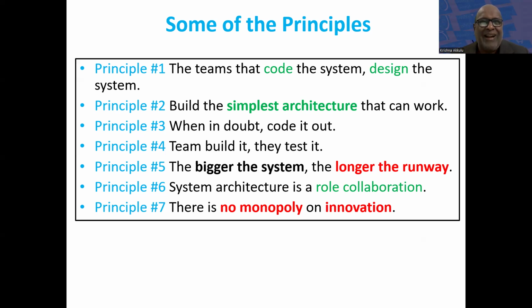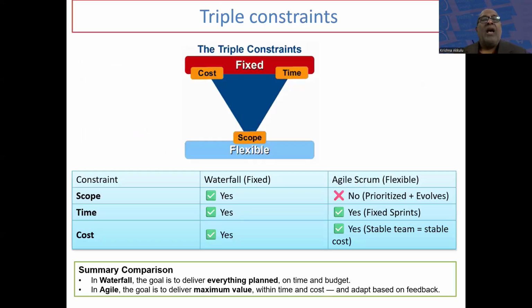We always want high performance teams in Scrum. We already talked about the triple constraints in waterfall methodology. There are three things: cost, time and scope. Here we said the Scrum team is a dedicated team, a self-organized, self-managed team. In the software industry generally, what happens? An important project comes, they remove some developers from here and move them to another project. The testers, if there's an urgent release, they move. But in the Scrum process, that is not allowed. The Scrum team is dedicated to a particular Agile project. Their job is to work only on that.